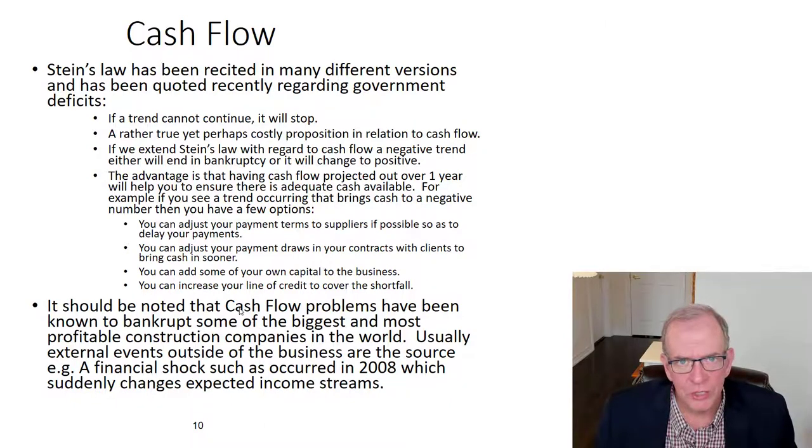Trades are not going to continue to work for you if you're not paying on your progress billing requirements. There'll be liens, there'll be client issues, and as I said, the house of cards begins to fall. So cash flow is important for those reasons. Now, if you stay on top of these things, then that can be helpful.